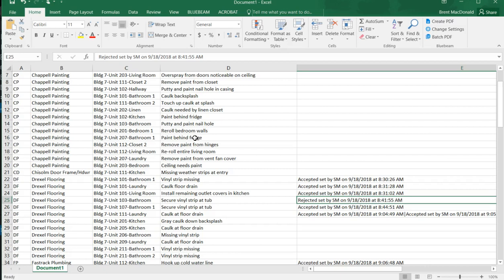But you could ultimately also give your subcontractors direct access into these files as a read-only access through some of the features through Bluebeam and Studio Project and Sessions, where they can in real time be following your updates to the punch list items. It doesn't notify them directly, but if you, for instance, send an email out to all your subcontractors saying, all right, I've uploaded and completed all the punch lists on building 7, you now can go in and access and complete those items in your iPads. Well, that works just the same as you taking the time to go through and export in Excel.